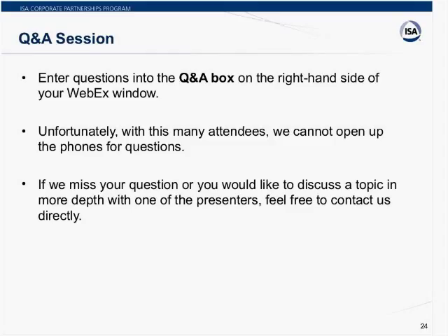And what I didn't mention earlier, but what's typical in the FEL3 stage, is an RFP and preliminary design and scope of work for any construction services that might be performed by a subcontractor. So, yeah, I would expect that. You would normally expect that scope to get refined and changed over each stage.